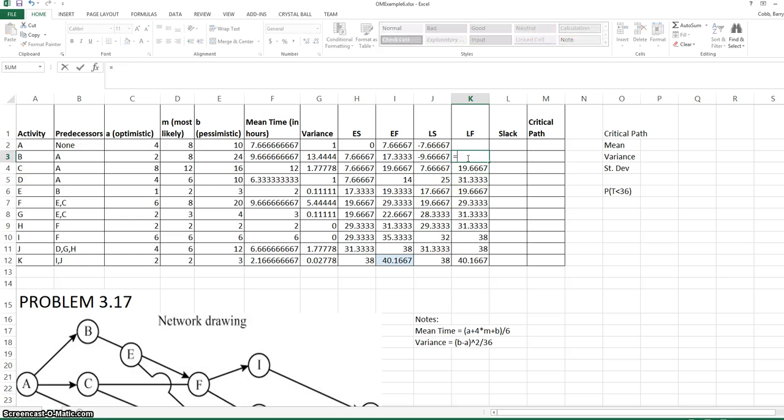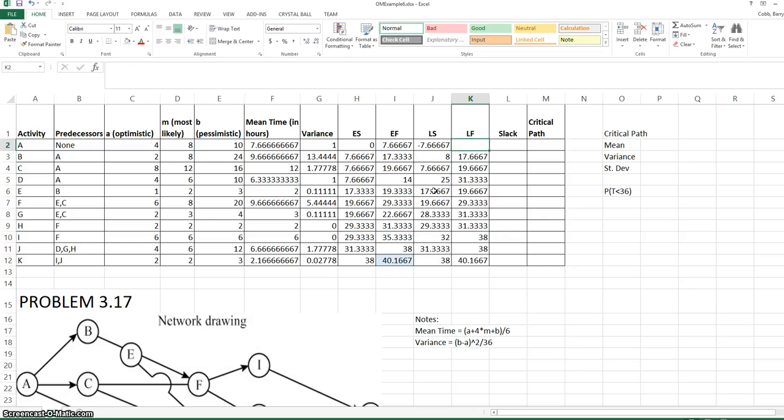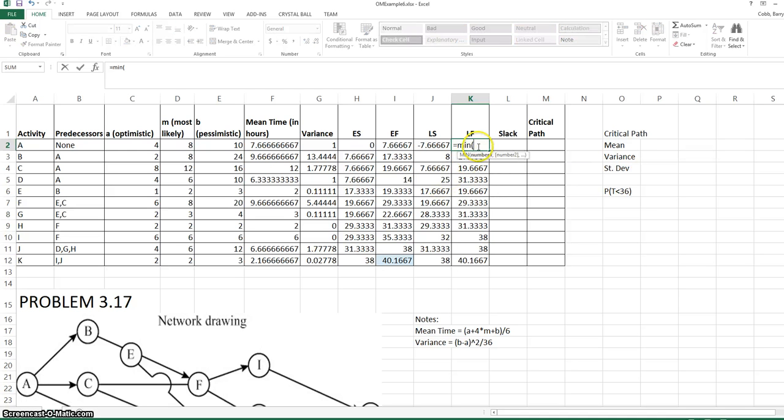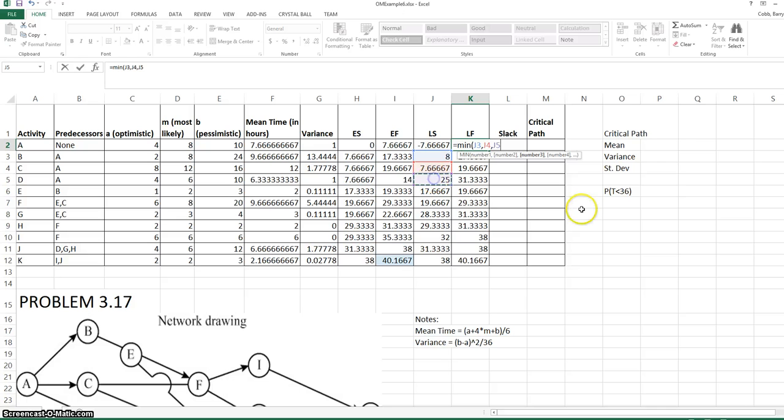B has one successor, which is E. A has three successors: B, C, and D. So it must finish before the earliest of these three late start times.